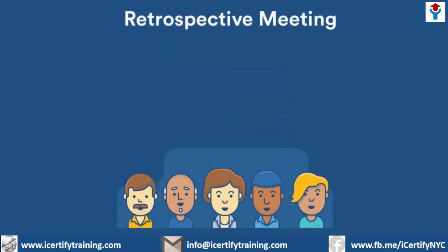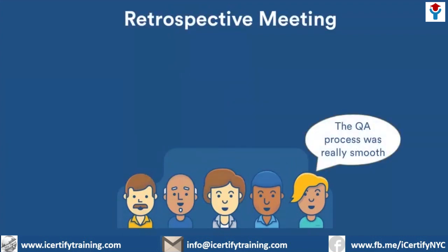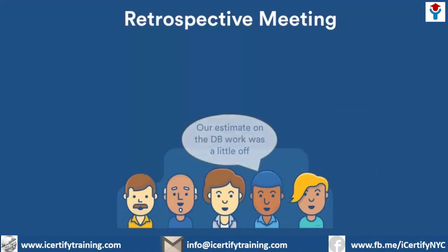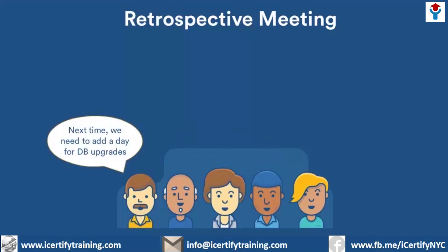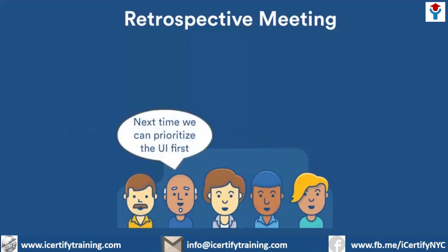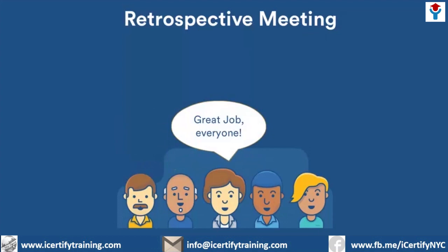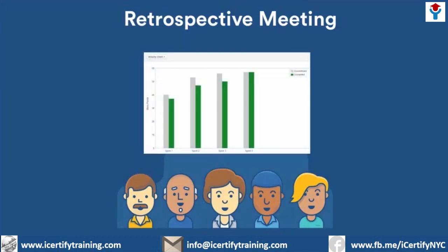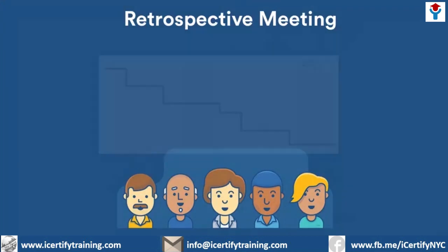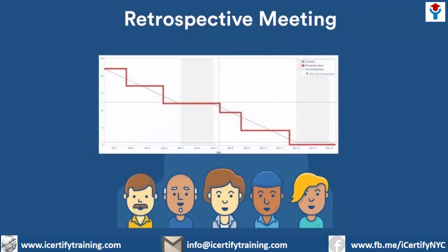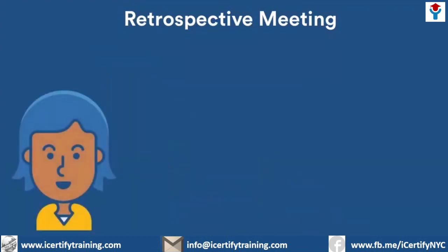The retrospective meeting is all about reviewing the sprint that was just completed to determine what worked, what didn't work, and what changes the team can commit to from a process perspective in the next sprint. It's equally about celebrating the changes that have worked, as it is about determining what needs to change in the future. Teams can use qualitative data from sprint reports, velocity charts, and burn-down charts to help answer these questions. You'll learn about these reports in the next tutorial. Now let's get back to the board and see how to end the sprint.